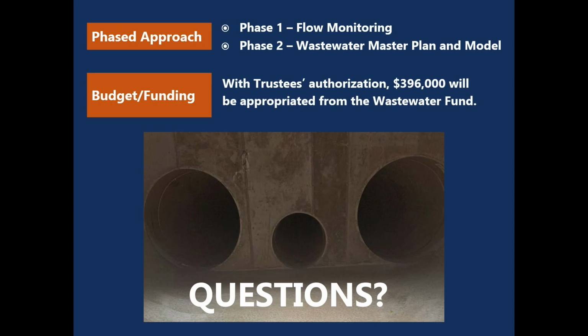So we're actually looking at this from a phased approach. One, because we need to get this thing going right now. We're moving into a time of the year where the active weather pattern is the best time for us to capture that good flow monitoring, the wet weather data. And so with the approval of the trustees this evening, we'll be deploying flow monitors, and within 2 weeks our consultant will. And there's two things.